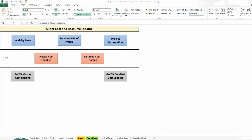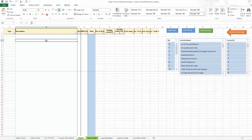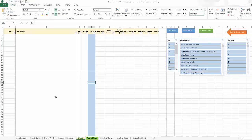We have two methods to create the cost and resources. The first method is very good and effective for master schedules which does not involve floors and types. Simply, I'll click here — I have a blank area where I can copy and paste directly the Bill of Quantity. It doesn't matter if you have spaces or unfilled information here because the Excel sheet will clean it up for you. So let me grab some information and paste it.